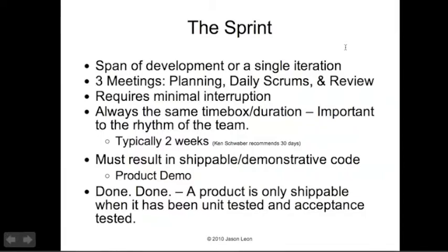The duration, now I've seen durations all over the place. Ken Schwaber recommends 30 days. Personally, I think that's too much time. 2 weeks would be, I think, the longest that I would want my sprints to be. I like actually 1 week. I think 1 week sprints are a solid choice, and I've tried everything from starting them on Mondays and ending them on Fridays to starting them on Wednesdays and ending them on the following Wednesday, and to each his own. Really, it's up to your group to decide when works best for you, and you'll do that by testing it.